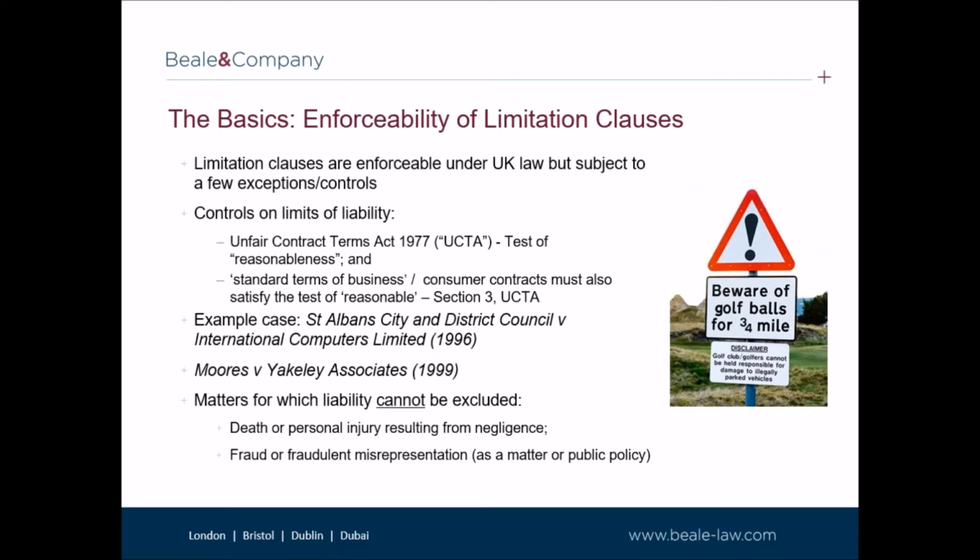An assessment would also need to be made of the damages that could flow from any particular matters, such as pollution and contamination claims. The amount of professional indemnity insurance cover is a relevant factor, but this does not mean that if the professional has, say, 5 million PI cover, the limit of liability for every appointment should also be 5 million. The monetary amount included in the limitation clause should be appropriate for the type of commission being undertaken.